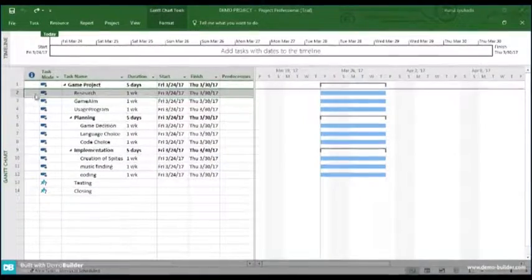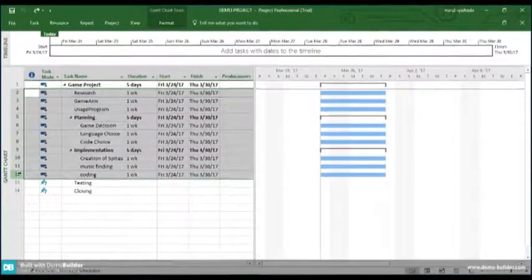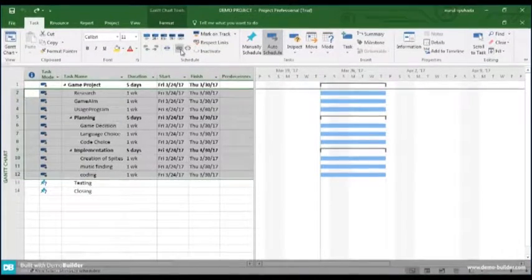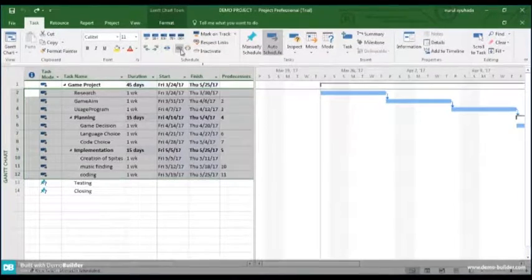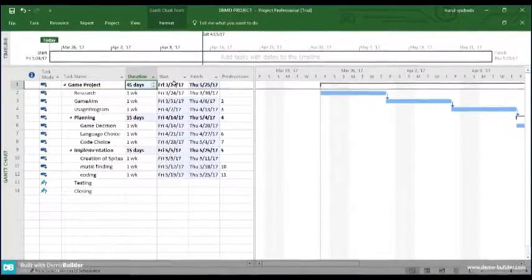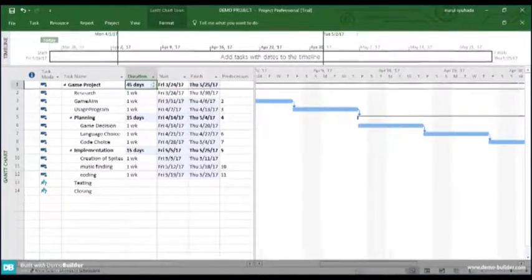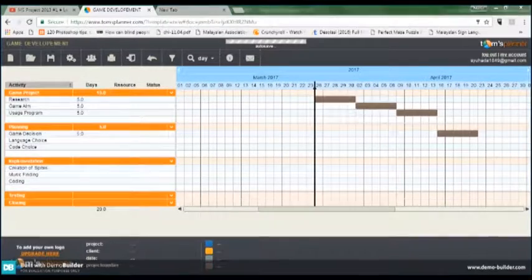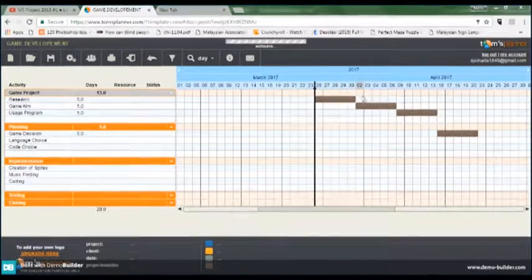For Microsoft Project, in order to create the predecessor, you need to link all the tasks from start to finish. Predecessor is used to calculate the duration of manually scheduled tasks. Note that when the task gets switched to be automatically scheduled, the start and finish values might change based on predecessor relationship, the project start date or other schedule factors. The duration value, however, will be preserved. There is no predecessor in this planner, so the tasks will not link with each other.